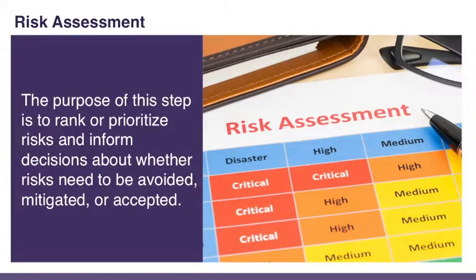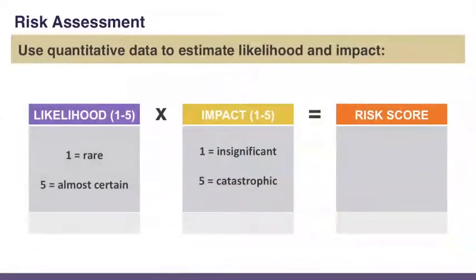The next step of ERM is risk assessment. The purpose of this step is to rank or prioritize risks and inform decisions about whether risks need to be avoided, mitigated, or accepted. When possible, use quantitative data to estimate likelihood and impact.